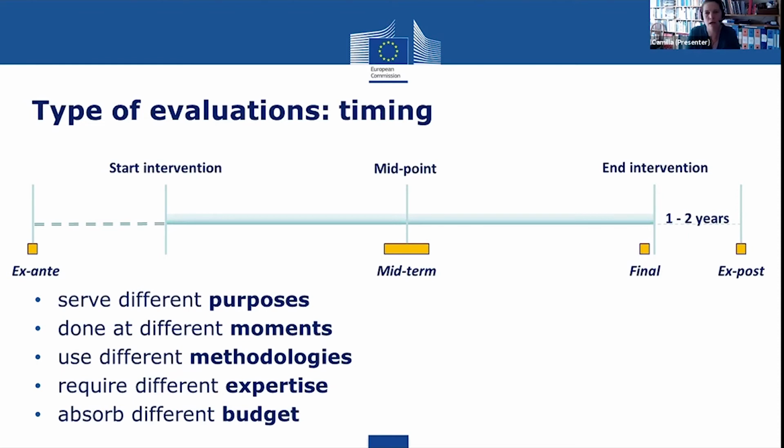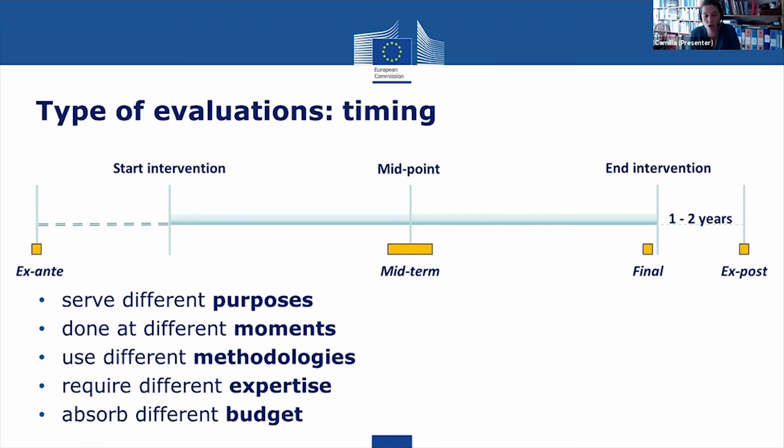Because when you carry out a final evaluation, you want to make sure that you are able to speak with a number of actors, implementing partners, target groups, counterparts. And these will be available at the location of the project or the locations of the project up until the end of the implementation period. Then the implementing partner, if it was a TA team or specific experts, they will leave, they will go back. Of course, you can contact them by phone, but it's not exactly the same thing. So make sure that the final evaluation is launched so that the evaluation team, the external evaluators, can get into contact with the whole set of stakeholders before the end of the project. And then, yes, you can have other phases which extend beyond, but it's important that it starts before.